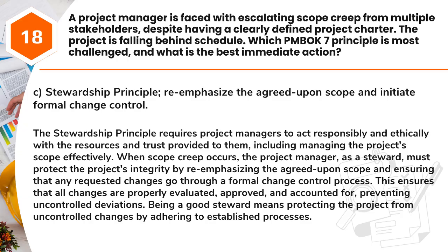When scope creep occurs, the project manager, as a steward, must protect the project's integrity by re-emphasizing the agreed-upon scope and ensuring that any requested changes go through a formal change control process. This ensures that all changes are properly evaluated, approved, and accounted for, preventing uncontrolled deviations. Being a good steward means protecting the project from uncontrolled changes by adhering to established processes.